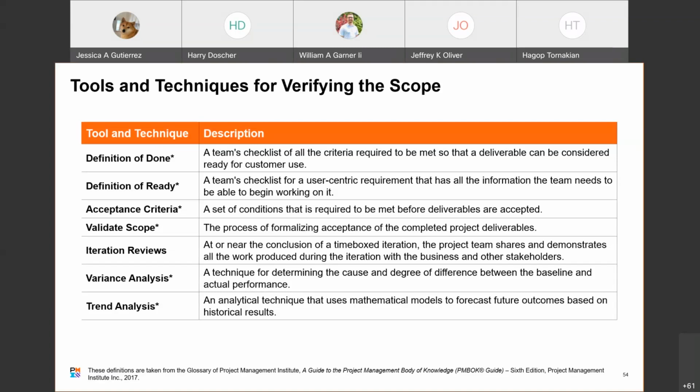In Agile projects, you're going to need to include the acceptance criteria up front. A lot of times, the acceptance criteria are used to build test cases, and some testing that is part of a regression test plan, things like that. So it's really critical to get clear, concise acceptance criteria.